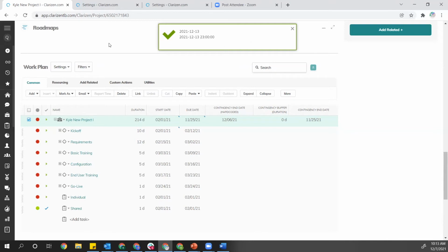And so today for me might be another day for you if you're on my team and you're using my same Clarizen instance, but you live in Australia or New Zealand. If you start to see results where things are 1 day off, you should probably start looking at your time zones and be aware that we're looking at date times, not just a simple date field.